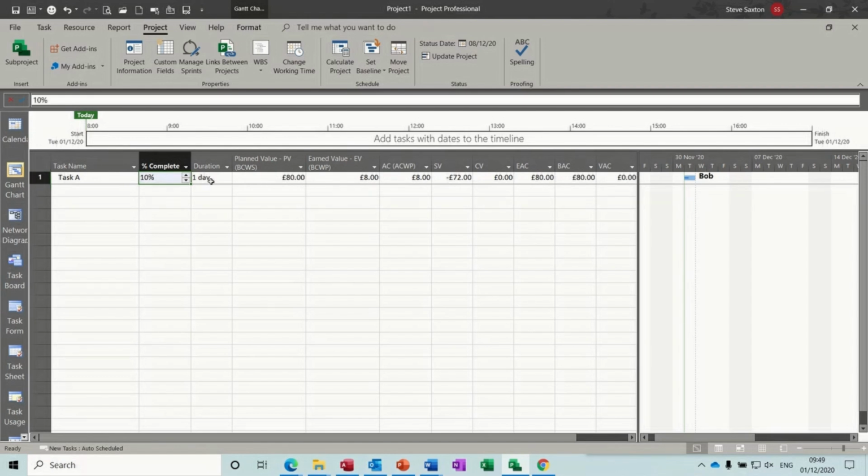Okay, let's change the duration to 2 days. If I change that to 2 days, now you get the cost variance field coming up. If I go back up and change this to 20%, that went back down to 5%, but I put it to 20%. You can see that the cost variance field is now changing because the duration has changed, and we've got a resource on it that we didn't plan to have, and also the scheduling variance has changed because of that incurred extra cost.